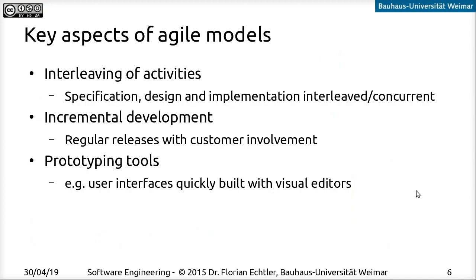What are the most important aspects of agile models? We always have interleaved activities — specifically, specification, design, and development happen in cycles or even at the same time. We follow an incremental development approach with regular releases, maybe every two weeks, that the customer gives feedback on. We also use prototyping tools — for example, building a mock-up of the user interface in HTML5, quickly put together just to show an idea of how the UI might look, or even paper prototyping where you sketch it out on paper.